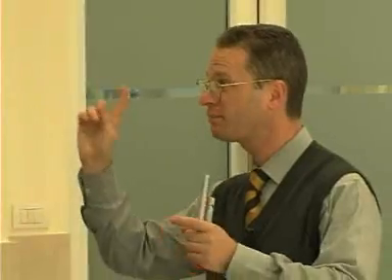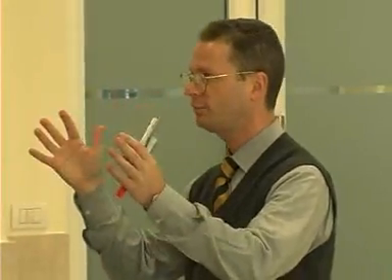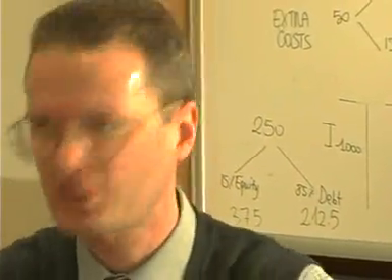Have you got it? Sufficiently clear? Any question about the concept of standby equity? Standby equity means you don't have to provide me additional equity now, but you will do when an unexpected event arises, and as long as banks are open to finance this additional extra cost, you must be open to provide new money, no more and no less than the exact original proportion between debt and equity. It is quite fair in this sense.